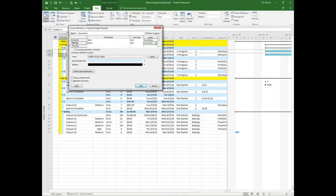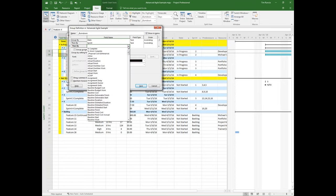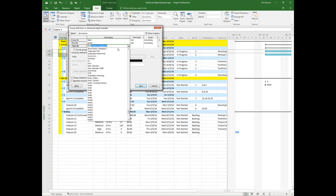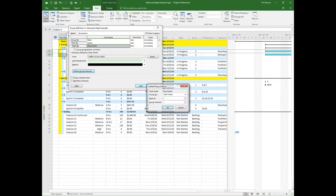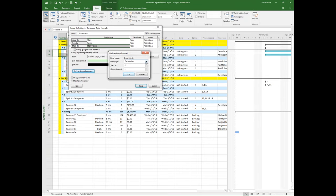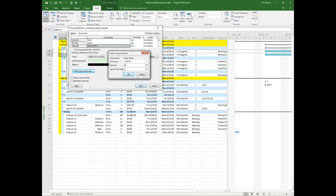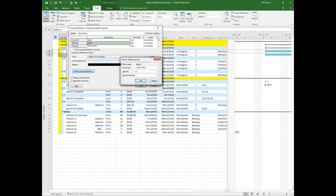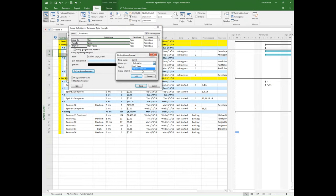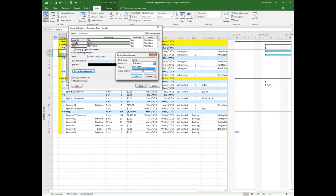So I can say, let's also group by sprint. And I can choose the order, ascending, descending. And you'll find that you actually have the ability, especially even if you're putting in number fields. If I come in here and I go, where is those story points? Well, here's my story point field. How do you want to group that? Well, I can come in here and define what the group intervals are. And it'll recognize, I can group on each value. I can do it as an interval of 100. So let's group all the 100 task levels. How many story points do we have together? All activities that fall under 100 and fall under 200. So if I look at using a number field versus a text field, watch this. I click on define group intervals. It says you can group on each value or you can do characters. Project recognize whether it's a number, a text, a date field. It allows you to group things together, especially if you're dealing with dates.